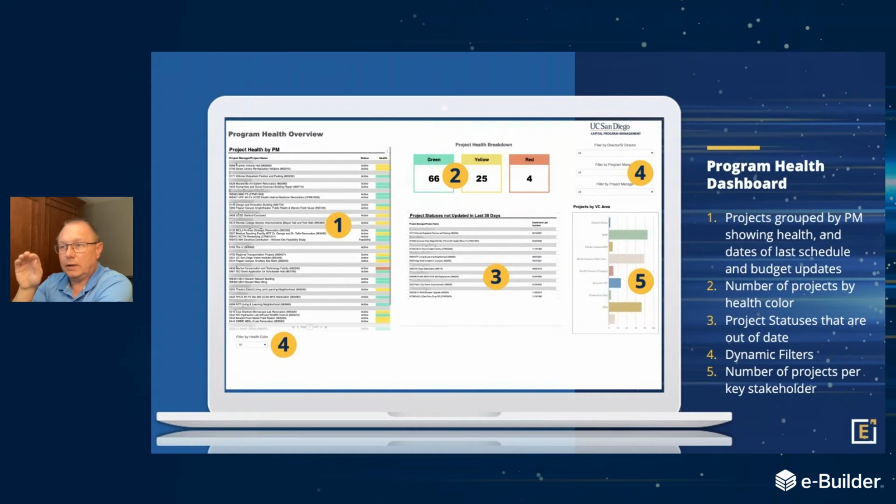So you can look at a PM, see the projects they have that are active or in closeout, and what's the status of the project, what's the health, is it red, yellow, green. It can also provide some clues if there's maybe some consistency in the colors with a PM, maybe an issue with staffing, a little bit of an overload on projects. That can point out some issues where the director might need to step in and help out a bit.